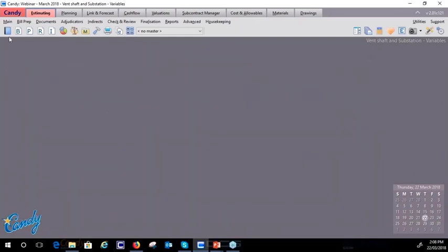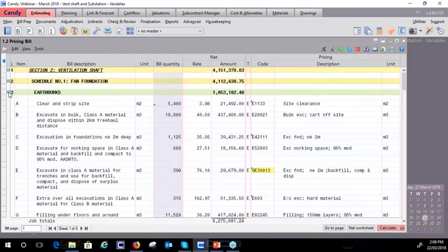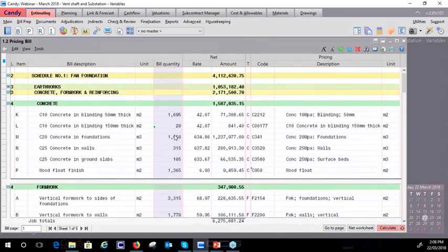Close the definition and settings, open the BOQ. Now that various waste values have been defined as global variables, estimators can, inside their worksheet, use the same defined code in their formula, typed also within square brackets. Example, C20 concrete and foundation.